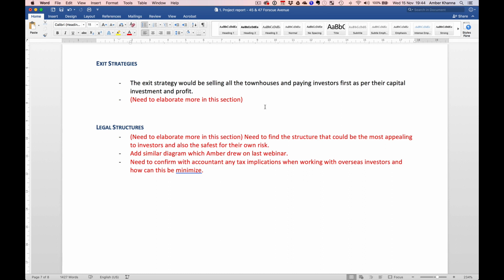So if you already got your 4 pre-sales or 3 pre-sales, you already know, okay, 3 pre-sales is good enough. Some of the amount will go to the bank, and then some of it will go to GST, and then the last 2, the developer's profit, is usually in the last unit that's left to sell. Okay.